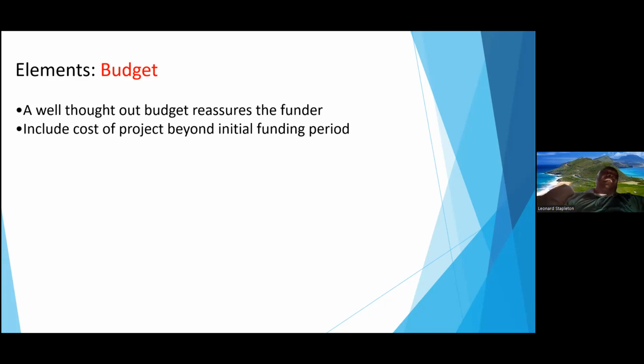Most of the time, I recommend that you just do a specific project that falls within the threshold of the amount that the funder is giving. Let's say you've got a big project, let's say a greenhouse in 5 communities, that's going to cost you $60,000. But you have a funder giving $20,000, and greenhouses are one of the things they're funding. You can do your project and just limit it to 2 areas. You don't have to always do all of it, especially if it's a specific project.